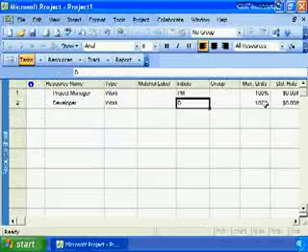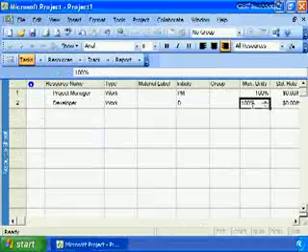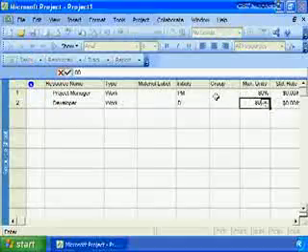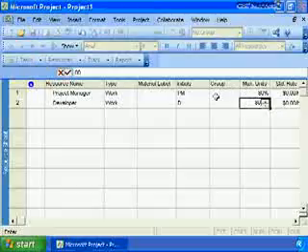The key focus here is the max units. This is saying the project manager is available to work on the project 100% of the time: 8 hours a day, 40 hours a week. As we've discussed in previous nuggets, that is not a realistic resource loading, so we will need to change that. We're going to say our resources are available to work on our project a maximum of 80% of the time, leaving other time available for our resources to work on other duties as assigned.